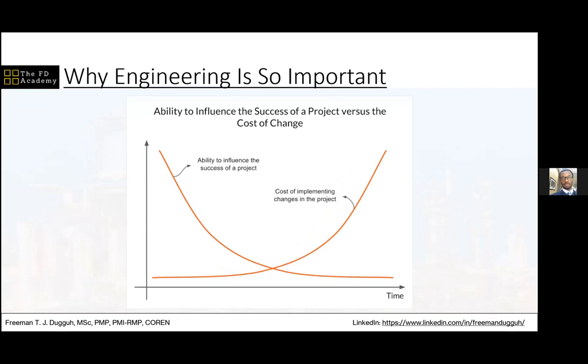Now, if that scenario was considered in the beginning, when the entire project was basically on the computer, it would be easy to delete and add and run the simulations and make the appropriate decisions. So the ability to influence the success of the project reduces, because when the stakeholders of the project sponsor have already spent money and you are telling them they need to spend more money, they are reluctant to do that. So influencing the project later in the life cycle of the project is more difficult. That's what these two lines here represent. Initially, you can have a high level of influence, but with time, the influence goes down. Initially, the cost of making changes is very low, but then it goes high.